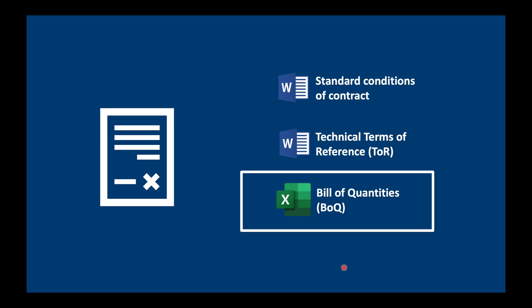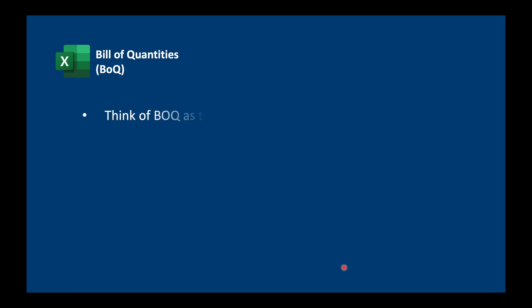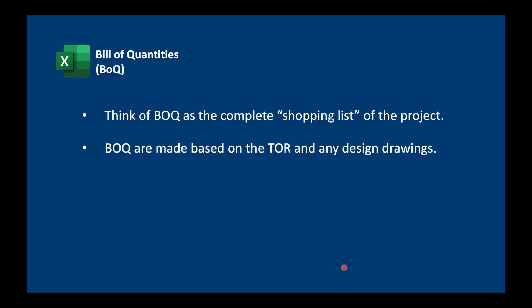Now let's have a look at the Bill of Quantities. The Bill of Quantities is a list of all the materials, parts, and labor — and the associated costs — required to complete a project. Quantities may be measured as units of lump sum, number, area, volume, weight, or time. Think of the BOQ as a complete shopping list of the project. The BOQ is made based on the terms of reference and any design drawings, and is very useful before, during, and after construction.